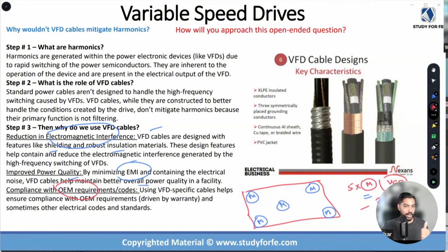And the time that is going to be required to procure these cables, the amount of money that is going to be required to get these multiple reels and then storage and everything is going to accumulate. So you've got to be really careful with this. And at the end of the day, if the PM is like, okay, use the regular cables, is there a cheaper alternative available? Then the OEM kicks in, right?